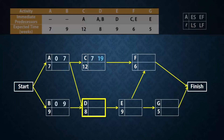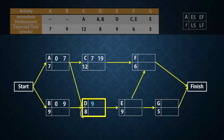D on the other hand needs A and B to finish before it can start. Since the earliest finish times for A and B are 7 and 9 respectively, and D needs both of them to finish in order to start, then the earliest time D can start is 9. In other words, the highest of the earliest finish times preceding an activity will be the activity's earliest start time. So D finishes at 8 plus 9, which gives 17.